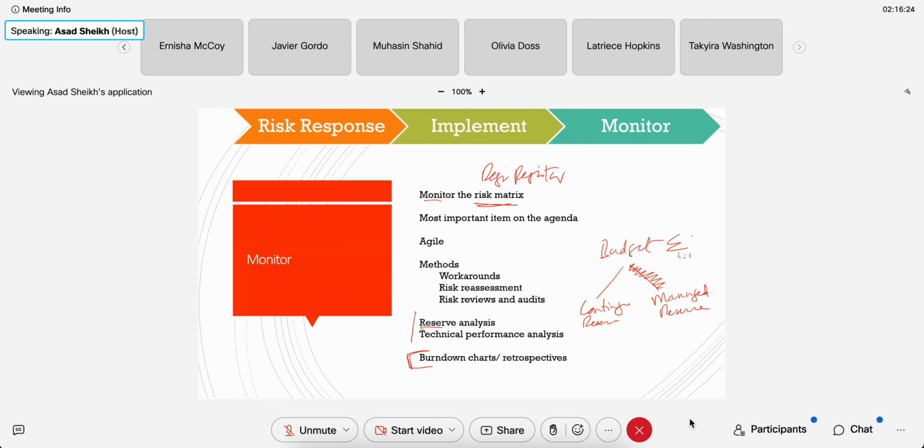So you have your budget aggregate of all your tasks, resources, components here. Plus, if you have any EMVs, they would be part of that task. You would have it separate, and then you have the contingency reserve. Maybe contingency could be 10%. You put that on top of your budget, and that becomes your budget. This management reserve is in case, let's say you're in a project in the execution phase, and you need additional dollars.